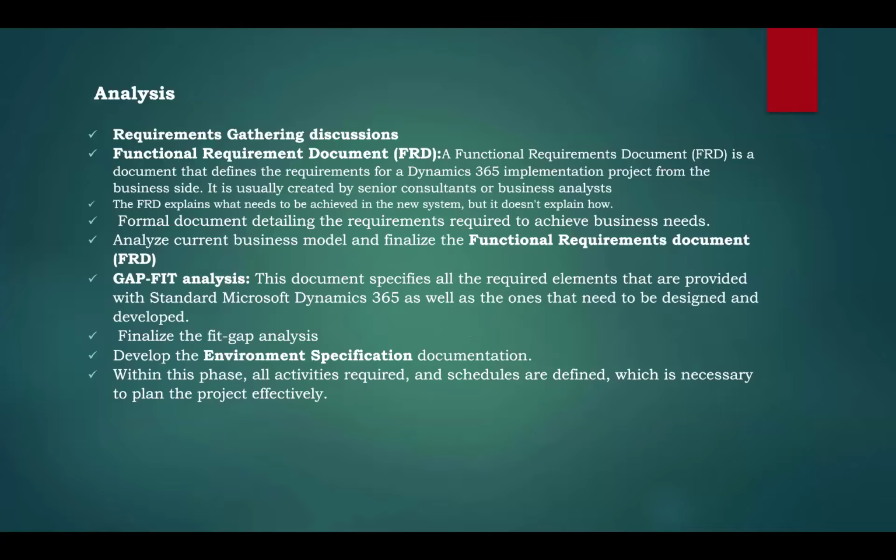We'll give them each and every requirement ID across the modules like GL, any modules, whatever they're using, right? We'll convert them into the requirements, and then we'll also understand whether that is standard. Let's say out of 100 requirements, 50 are standard, which you can see straight away in D365, and 50 are not available, or you need some more information, it might need some customizations. All those discussions we are going to do with the customer.